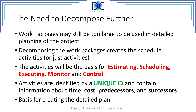Work packages are still too large to be used in the detailed planning of the project. In fact, there may be smaller projects where the work package is in fact the same level as an activity. In that case we don't have to decompose further. When we decompose the work packages, we create the schedule activities — we typically call them just activities.